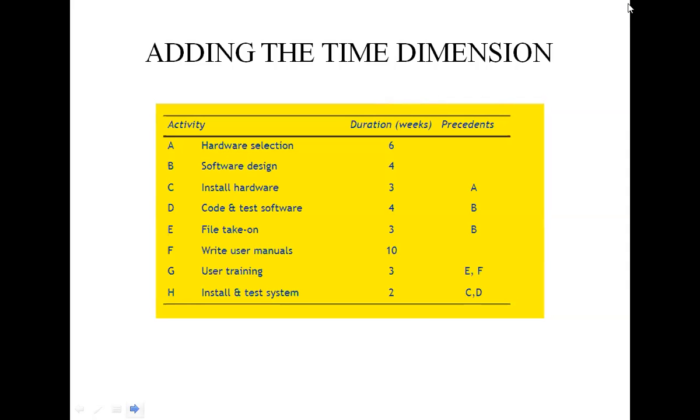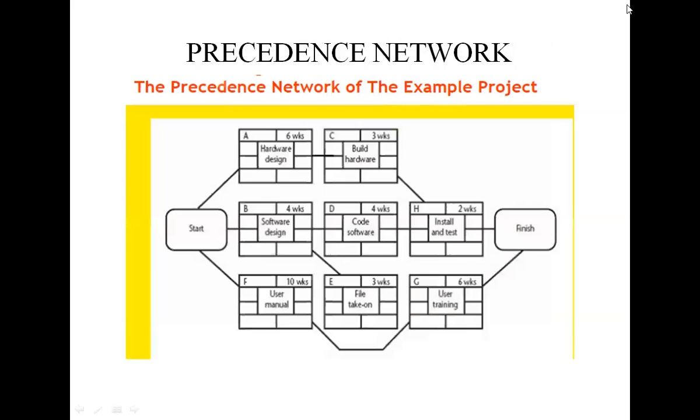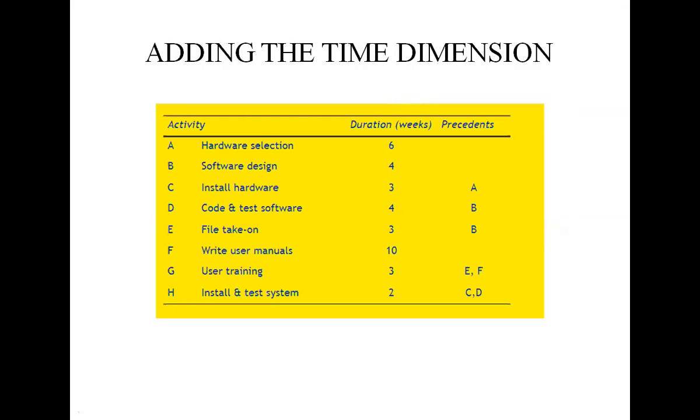Here the critical path approach is concerned with planning the project in such a way that it will be completed as quickly as possible, and also identifying the activities where a delay in their execution is likely to affect the overall end date of the project or later activities' start dates.